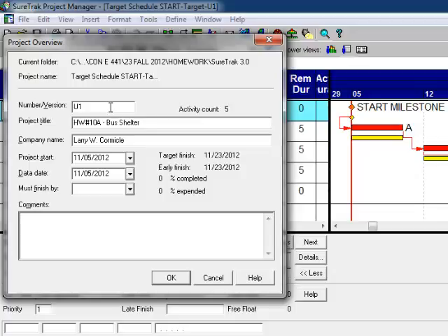If you don't know the number and version, how are you going to read it later? A week later, a year later, 6 months later, when you're trying to either prepare a claim against your owner or you're trying to defend a claim against a subcontractor? Documentation that doesn't tell you what version it is, in my opinion, is completely worthless trash paper.